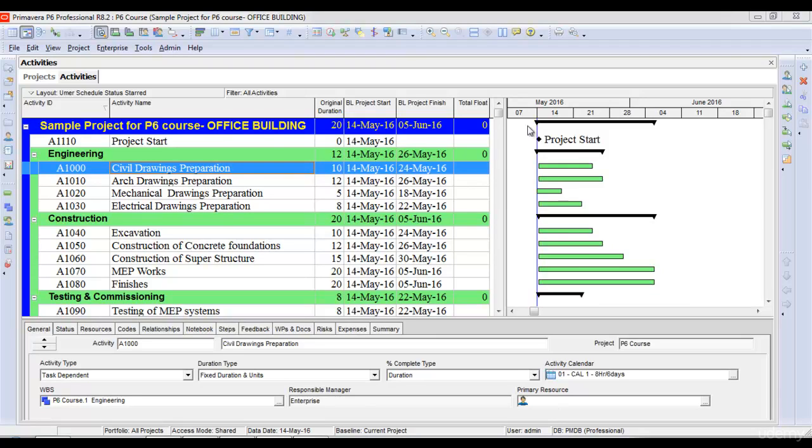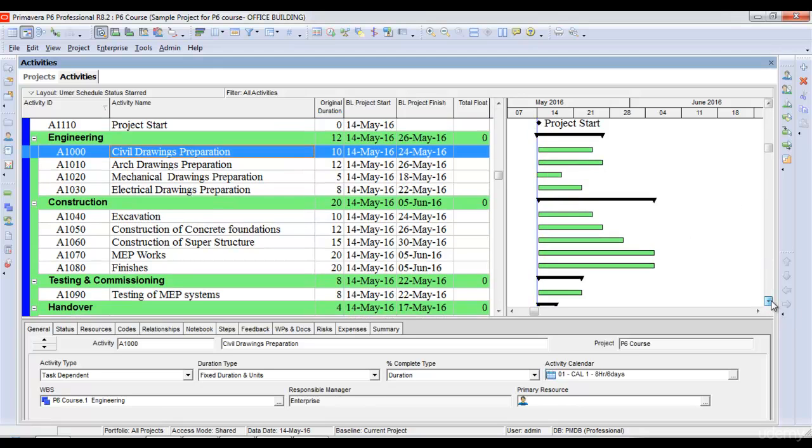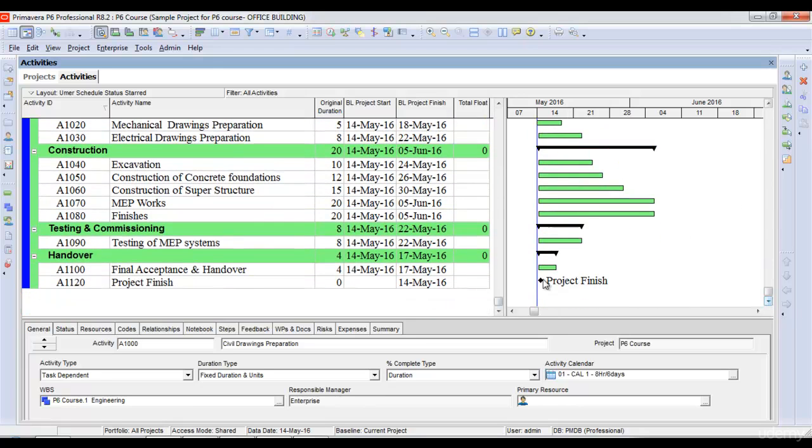In the Gantt chart, project milestones are shown by this diamond sign, and activities are shown by green bars. I have two milestones: project start and project finish.